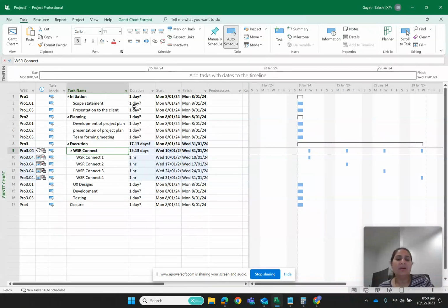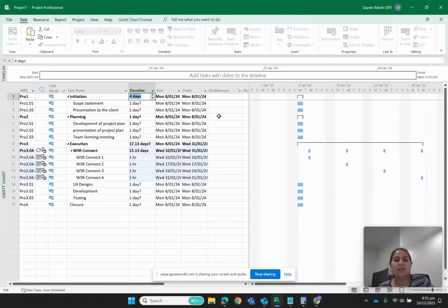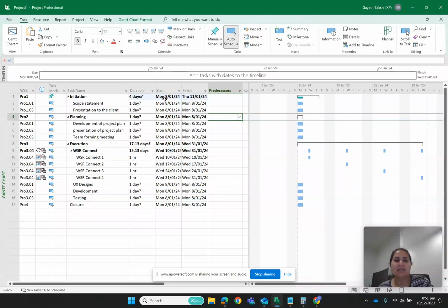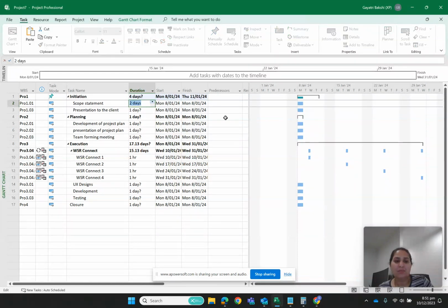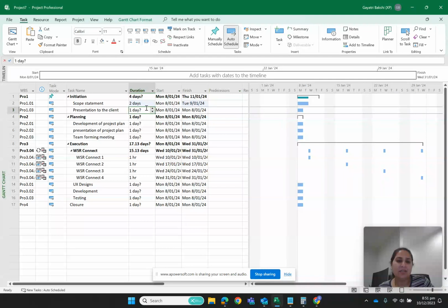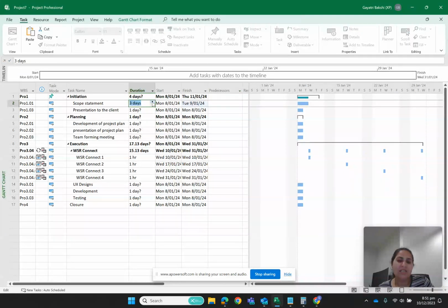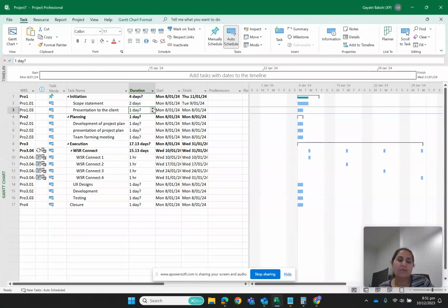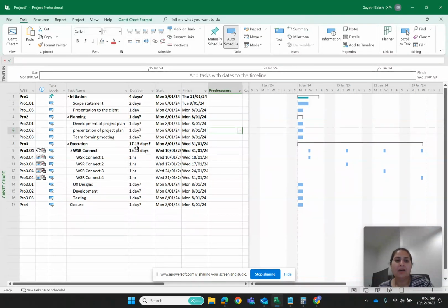Okay, now I say that my initiation is going to be for 4 days. So I define these 4 days. You will see that 8 to 11, these 4 days have been defined. I am going to take 2 days for the scope statement, and I'll take a day to present this to the client.